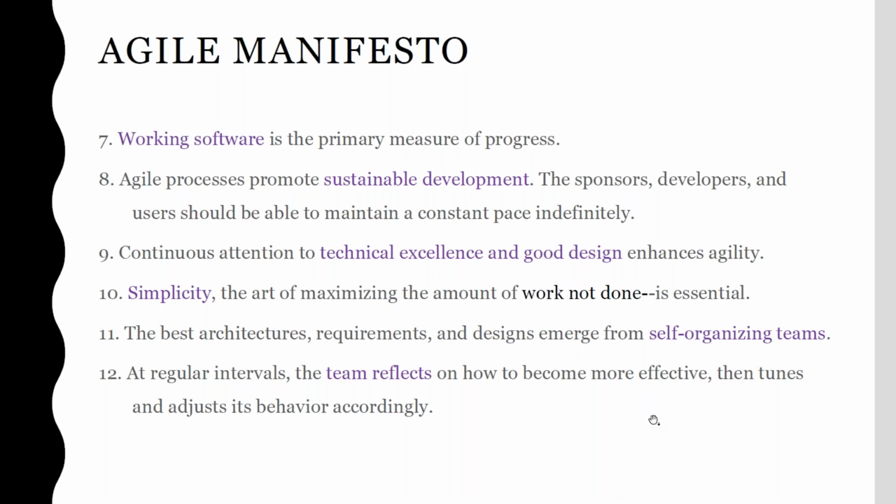Whatever we have learned in this meeting, there is a 100% chance you will be implementing it in the next sprint itself. Because on the last Friday of the sprint we have this meeting, and from Monday onwards you start the next sprint. So whatever you have learned from this retrospective meeting, you have the chance to implement from Monday, that is, from the second sprint onwards. That is why this retrospective meeting plays a vital role in your self improvement in your organization.